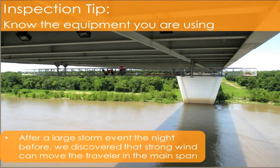And then once the staff started seeing how well the motorized winches were working, and they got sick of climbing the towers, they were like, "Hey Ryan, can you motorized winch us up?" And so, sure, okay. Then we started motorized winching people up the towers, and our productivity really started going. But don't underestimate how long it takes to stack an 800-foot rope bag, because it takes a long time.